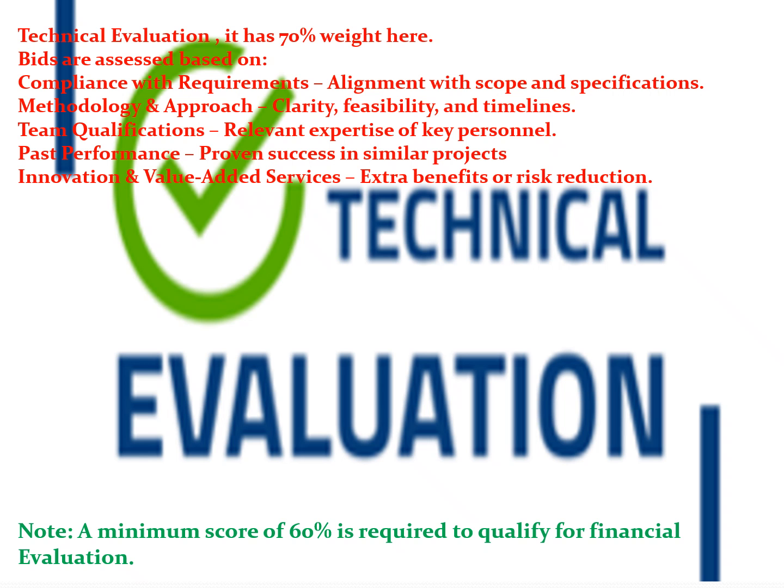For example, all submitted bids will be evaluated in 2 stages. The first stage is technical evaluation. It has 70% weight. Here bids are assessed based on compliance with requirements, alignment with scope and specifications, methodology and approach, clarity, feasibility, and